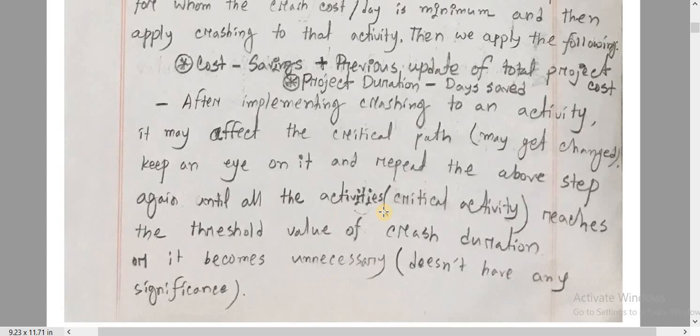Another reason to stop crashing is when it becomes unnecessary — that means it doesn't have any significance. The main purpose of applying crashing is that our project duration becomes less. However, if the additional crash cost exceeds the savings from reduced overhead, crashing will not make sense.